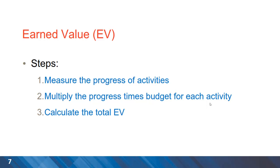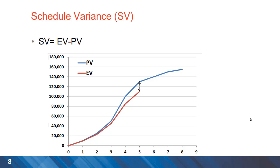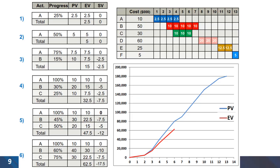For calculation of earned value, we can follow these major steps: measure the progress of activities — the actual progress made on site — then multiply this progress by the budget for each activity to calculate the earned value. The important performance metric of schedule variance is then the difference between earned value and planned value.